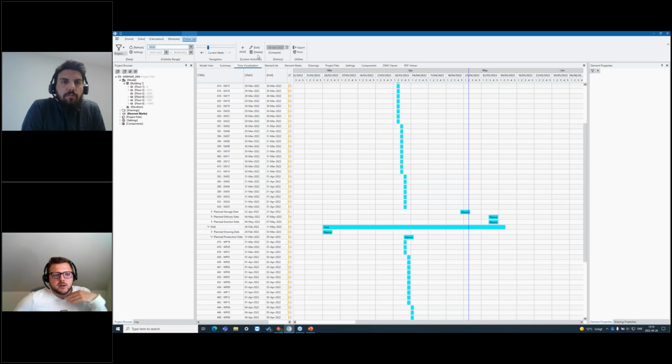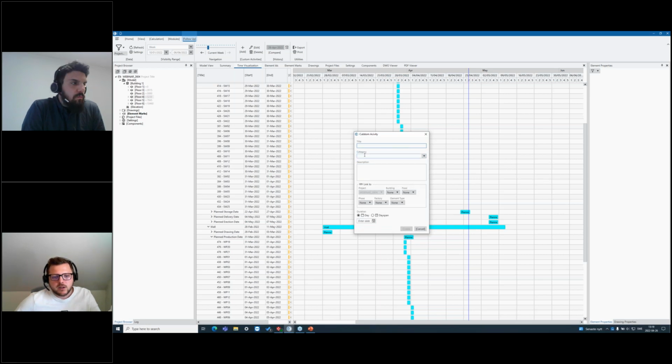And the custom activities here we talked about, but I can just show you how to add it. It's very simple. The only thing you need is to add a title and place it under a category that you decide. In this case, I created the categories cranes and preface, and then some description for it, and if it's connected to something. As default, it's mandatory that it's connected to the project, of course, but you can also connect different activities to different parts in the project like this, and then you can put the duration later on.